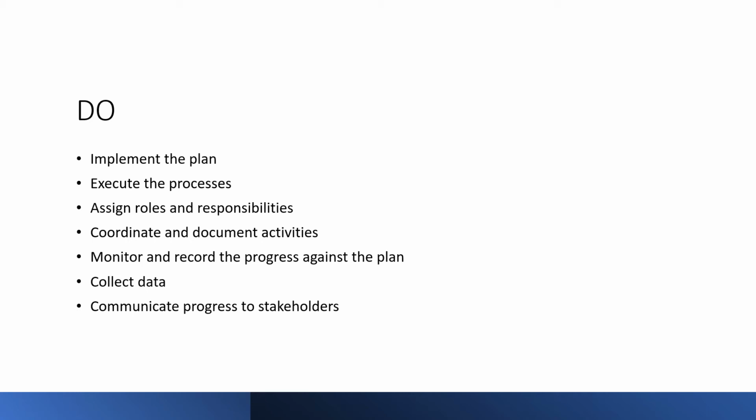For example, today one task is assigned to you. Okay, you are supposed to complete the task by today itself. Then at the end of the day, you have to write down that the assigned task is fulfilled or it is in progress, how much percentage of the task is completed and how much more time is required. So this kind of idea you will have, and this kind of monitoring activities you have to do in the plan, in the do phase.